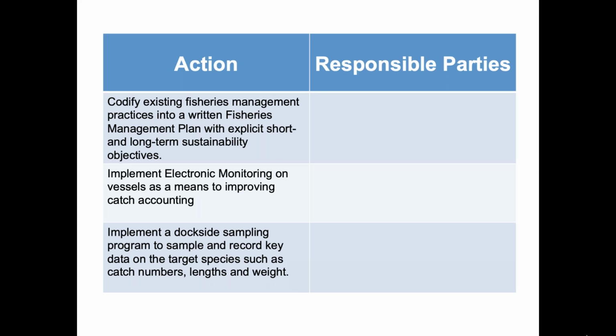Yeah, I think it could be a bit of an iterative process. You can list, and you should list, anybody who is needed in order to achieve an action. If members of the government are needed to achieve an action, to implement something into regulation, for example, then they should definitely be listed. Then there might be a time within the work planning process where you sit back and look at your responsible parties and say, okay, all of these people are around the table here, but these others are not. How are we going to make sure they are aware of and willing to participate in this work? Sometimes, like you said, that can't be a formal agreement, but there should at least be a line of communication, if you realistically expect something to occur.